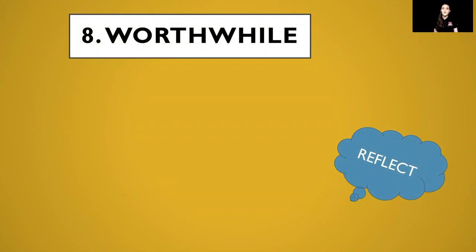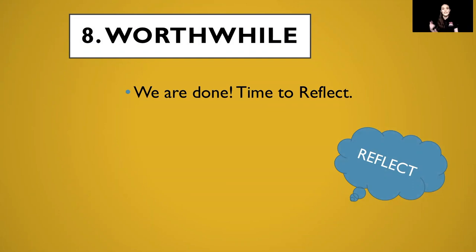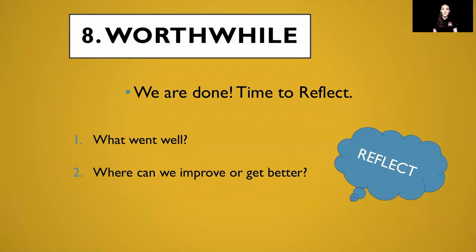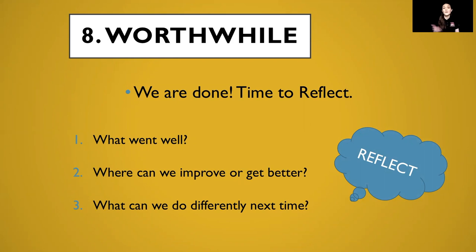Our eighth and last W focuses on 'worthwhile.' At this point we've completed the assembly and now we take time to reflect on our process. The first question is: what went well? Maybe we were great on our timelines and all tasks were completed by the due date. The second question is: where can we improve? For example, instead of doing announcements only one week prior, maybe we should start two weeks out to get the word out sooner. The last question is: what can we do differently next time? This completes the eight W's to project planning, a resource that can be used at any site for any type of project.